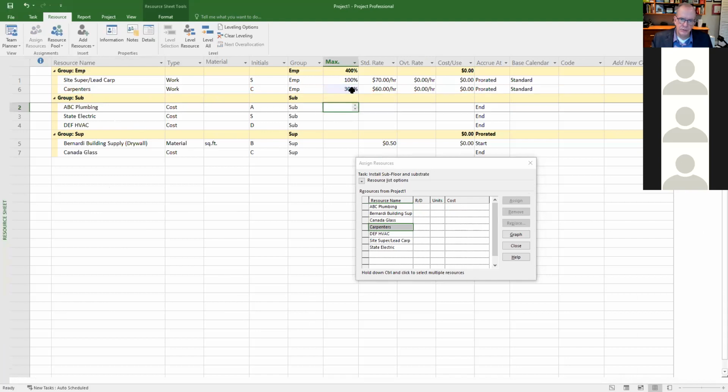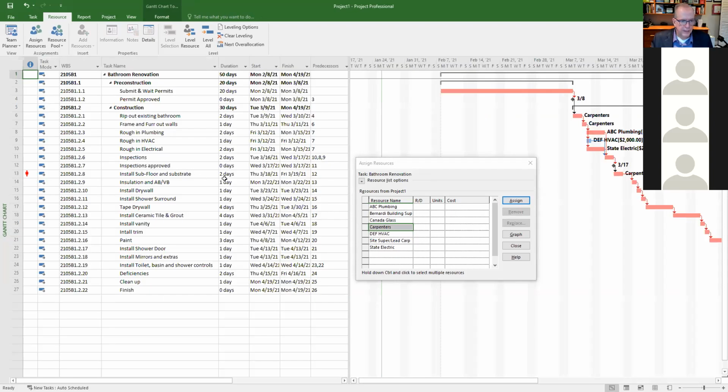I'm going to hire somebody else, or I'm going to get somebody else on this project, right? If I'm not okay with that, then I should go back to the Gantt chart and I see this, I should go back here and I should say, you know what? We're only going to apply 2. Now, I think when I do that, this number is going to change. So keep an eye on this.